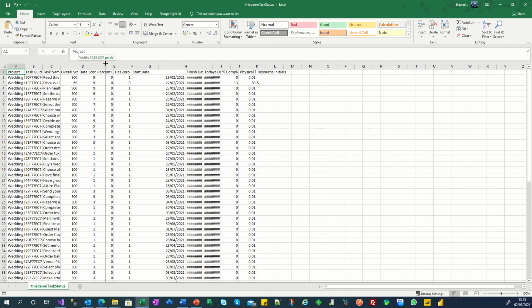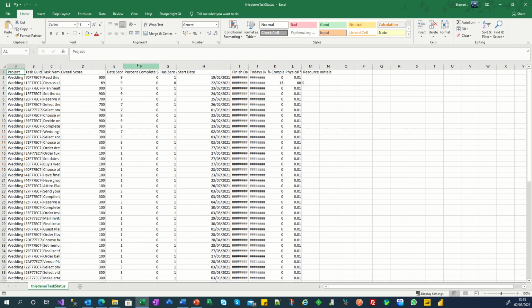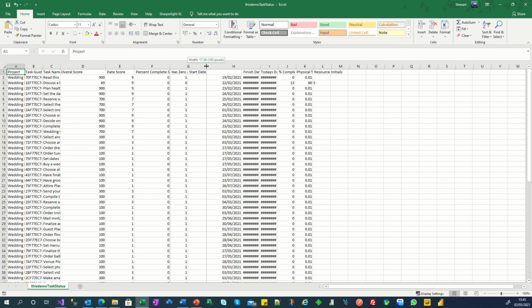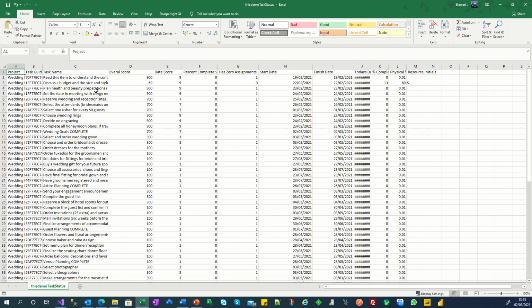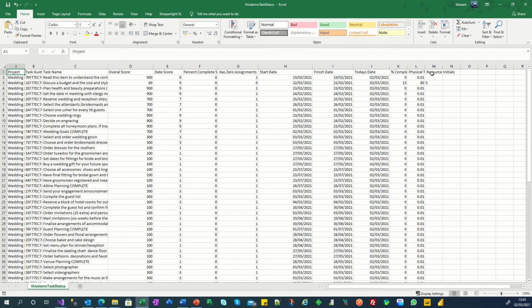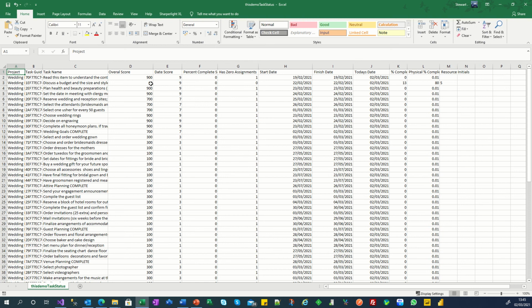Notice the scoring. So in the add-in, there's a way of scoring the performance of each task. It doesn't work with summary tasks. It ignores summary tasks, so don't put resources against summary tasks for it to work. And then the way that the overall score works, if you see the one that we've got performance against, we've done 80% of the work in 13% of the time, which should give us a good score.